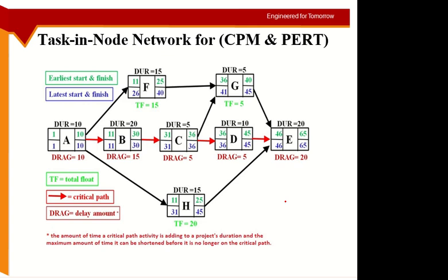We may have. Still, you need to finish the entire forward pass and backward pass to see if we have. Sometimes you may not have, sometimes you may. So you are asking about crash limits. One of the ways of finding out the crash limit is to look at the drag value. But the drag is just for the sake of the network.